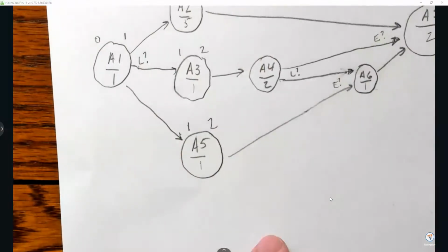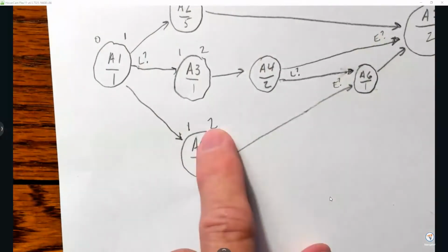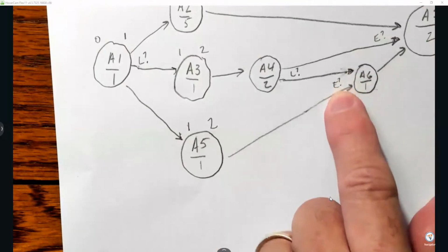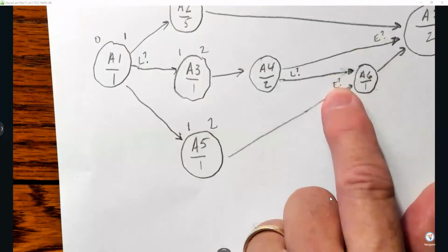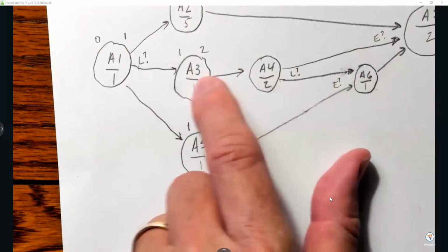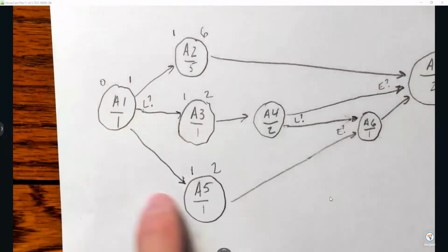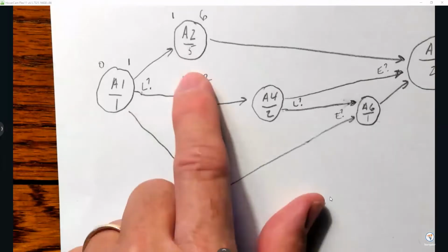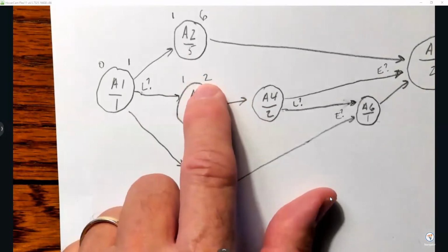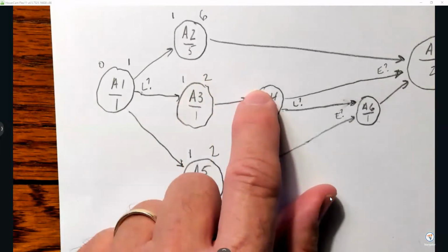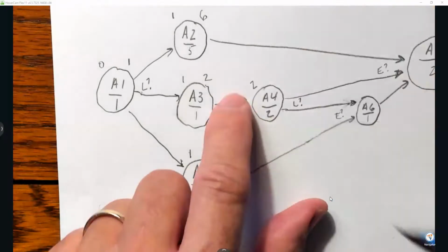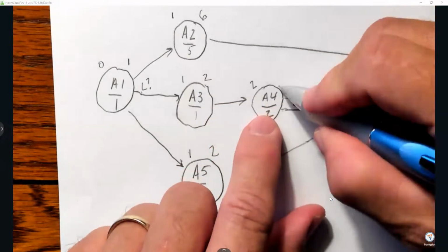All right, so I'm moving along, and I say, let me just go 2, and I move that 2 over there, and I say, whoa, no, I can't do that. I've got to make an E decision. So I go to this one, and I say, I don't know that one because I have to know this one first. What's the next one I can figure out? Okay, I have no E decision here, so the earliest I can finish here is 2. Therefore the earliest I can start this next one is after day 2 as well. So 2 plus 2 is 4.